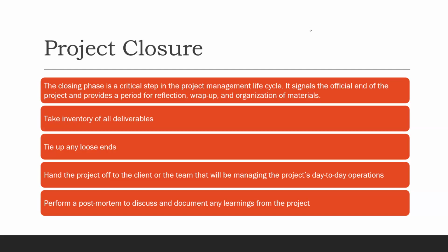On secondment, the person works for the Ministry for Government, but the person is also responsible for the child labor desk. And then the ILO would pay for that position proportion to the salary until such time the desk is settled, and child labor is totally integrated into the ministry. That is handover. So you do an official handover within the phase.